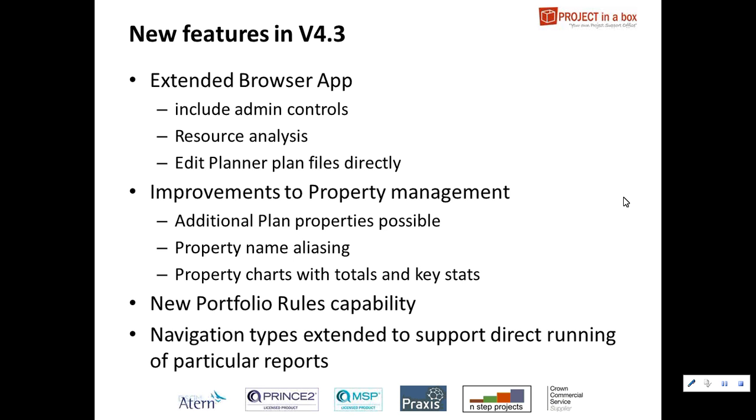People have also wanted to start pulling out particular data from named tasks, and this is something that you can now set up to match your own particular requirements. So if you've got a task in your plan, perhaps your templated plan, always called on-site date, then you can look for on-site date in each project's task library, and you can then pick out the attribute you want from that, like the start date, the end date, the comment, the percentage complete, etc.